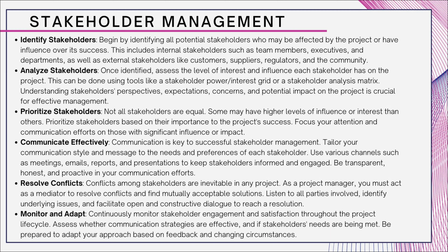Communicate effectively. Communication is key to successful stakeholder management. So you have to tailor your communication style and message to the needs and preference of the stakeholders and of each one. Sometimes you can't do each person if it's a tall list of stakeholders, but at least you should know for the important ones how they would like to communicate. One of the companies that I worked with liked using Slack, which is an instant messaging application, to reach out to stakeholders rather than emails. So I would send emails and I would also send the Slack so that if they didn't catch the email, they would be able to catch the Slack. So it's very important to figure out what's important to them, how they would like you to communicate. And that's a question that you should also find out and ask during the meeting with the sponsor, because the sponsor would have an idea of that.